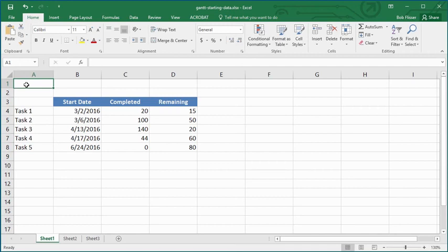There are also relationships involved. You can't start work without permits or have workers show up before materials arrive. A Gantt chart will also tell you how much of each task is complete and how much there is left to do. So what I'll show you here is how to create a Gantt chart from a simple bar chart.